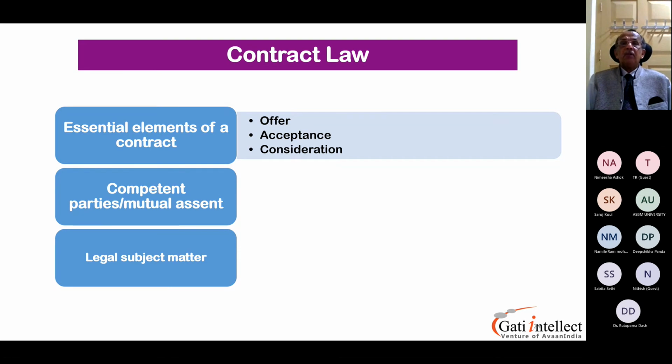When you talk about offer, what comes to your mind? What is the starting point for the offer? Before we talk of the contract, you should think of the RFP, request for proposal. Then comes the contract. Then the contract is evaluated and the contract is awarded. That's where acceptance comes in.